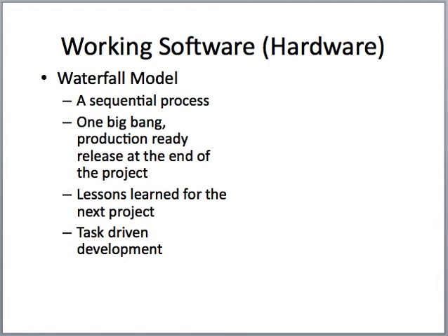There are opportunities for lessons learned in the waterfall model, most often called project postmortems, where you take what you learn on project A and then you apply it in future to project B. For me, the waterfall model has come to signify task-driven development, where after this big upfront planning phase, you take your project, you smash it into pieces, you put those pieces in a Gantt chart, you assign people to each of those pieces, and then you track your progress based on which pieces are complete.